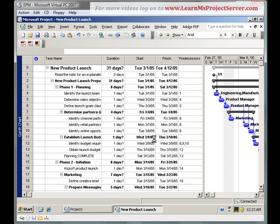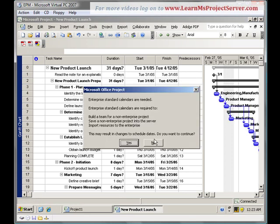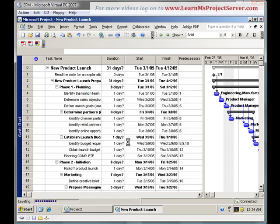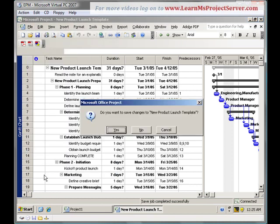Because I've changed the base calendar saying that standard calendars are needed or this will result in changes to the schedule dates, do you want to continue? Yes. What this will do is, it will shift these tasks from non-working days to working days. So, the save job is successfully completed. Go ahead and exit out. Do you want to save changes? Yes.